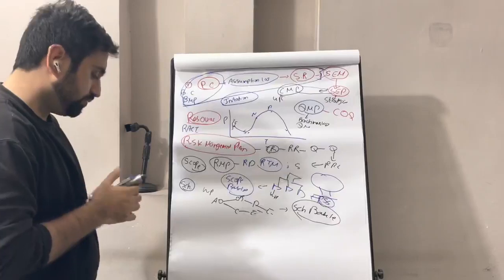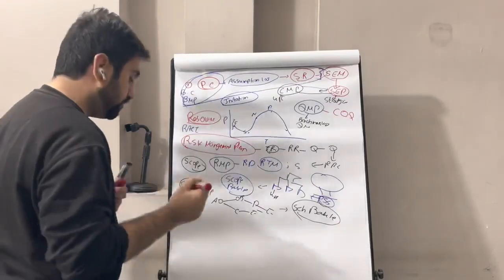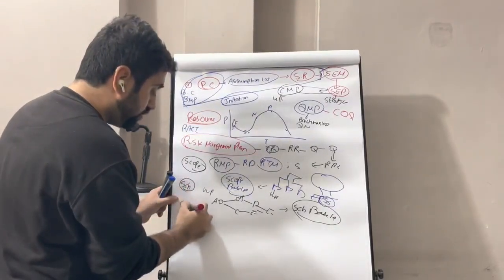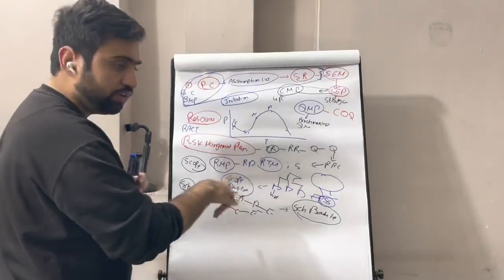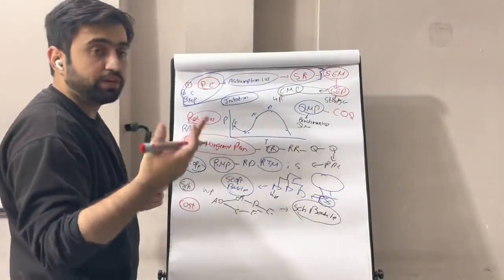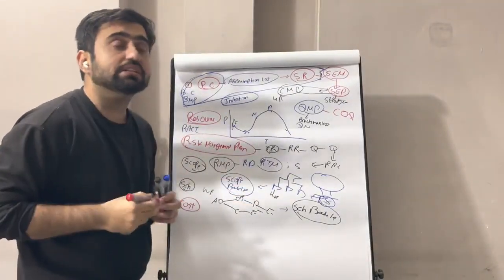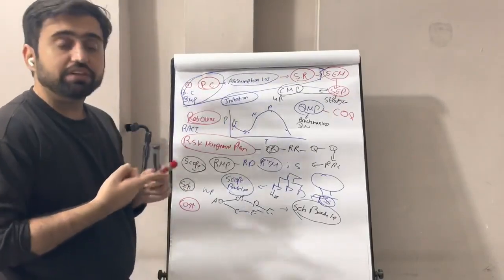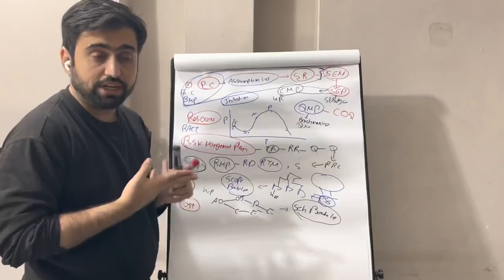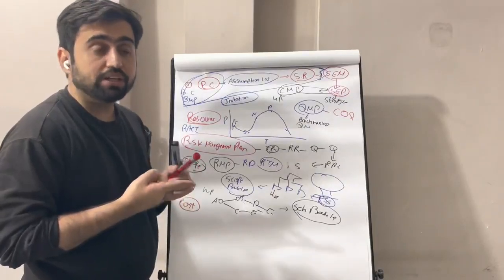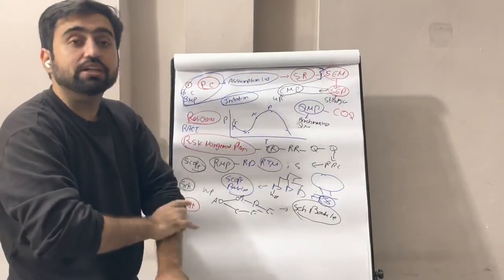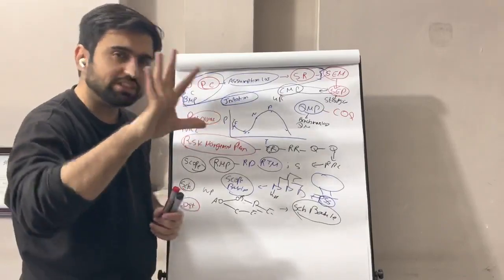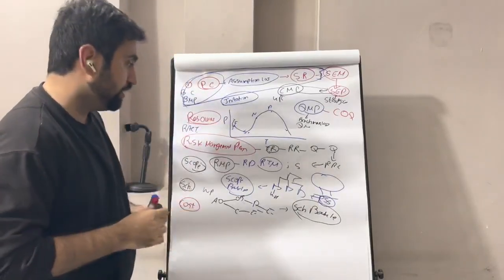Then we make a cost plan. We make a cost management plan. Through the cost management plan, we estimate the cost of each activity, and we get our cost baseline. Remember this: in cost baseline, activity cost plus contingency reserves are added. In the project budget, management reserves are also added. So that's a little bit different. I hope you understand this.